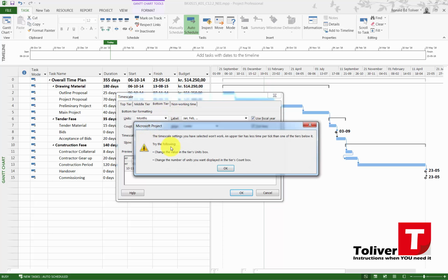The green line, the line you should always remove, in my opinion, is this: I'm doing a project that is supposed to start the 6th of October, and actually you can see I'm working in February, almost 4 or 5 months after the project started. So what you do is you right click, you say grid lines again. Instead of going down to the bottom to the project start, project finish, use the one that's called current date, and you remove it like that and say OK.